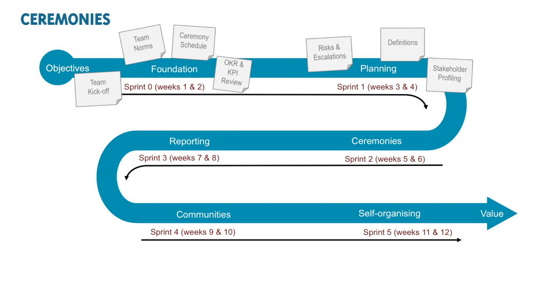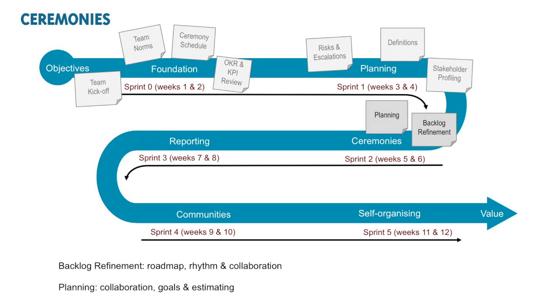Sprint 2 ceremonies. By the end of the second sprint, the 5 core agile ceremonies should have been established. Regular refinement of the product backlog, complete with an initial prioritization exercise. Planning sessions result in the clear definition of goals following an assessment of the resources available and current performance. Daily stand-ups remain focused on the 3 topics and do not spill over to discuss topics at length.